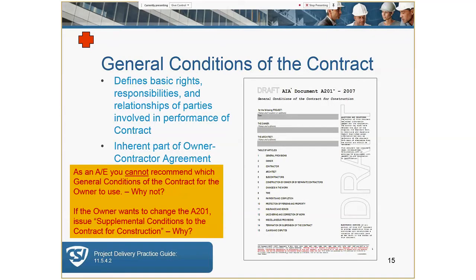The general conditions — the A-201 — defines basic rights, responsibilities, and relationships of the parties involved in the performance of the contract. We're going to touch on owner responsibilities, architect and engineer responsibilities, and contractor responsibilities. It's a document that tries to tie in everyone's responsibilities so the team can work as efficiently as possible throughout the actual construction project. As an architect, you cannot recommend which general conditions to use because that would be practicing law.